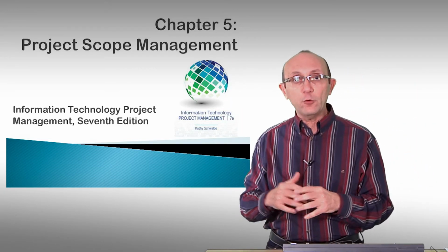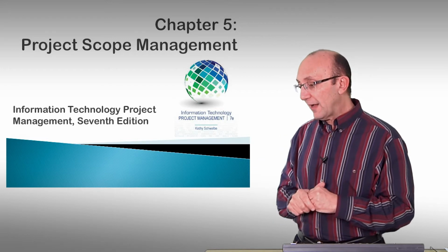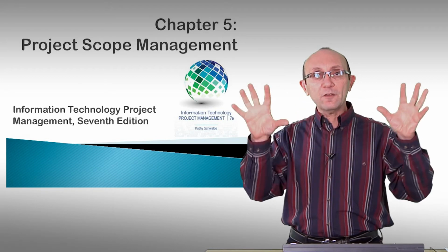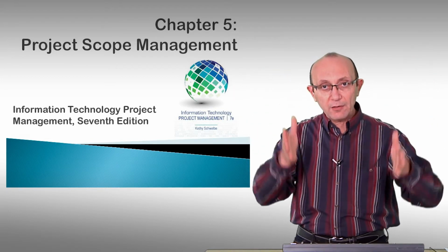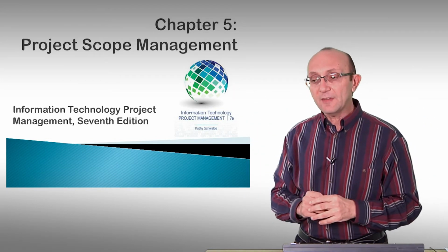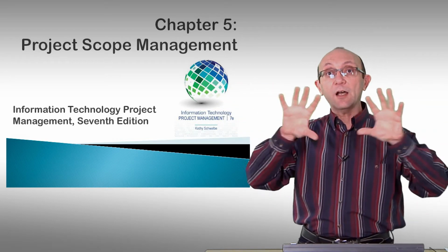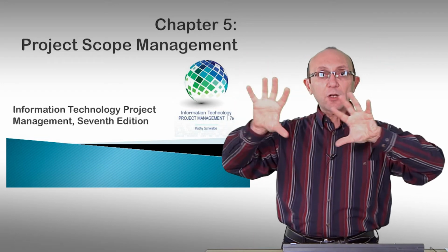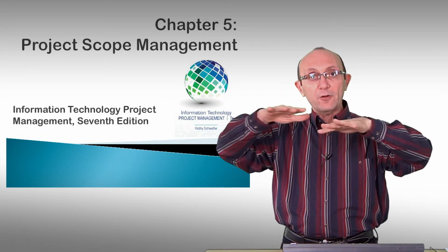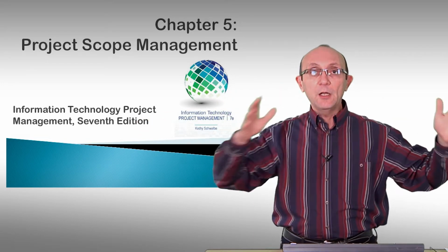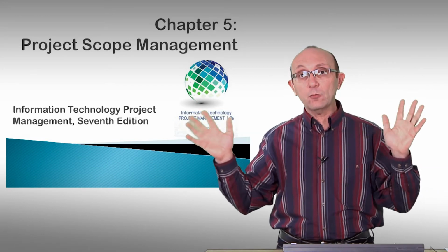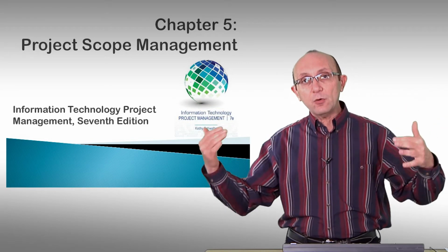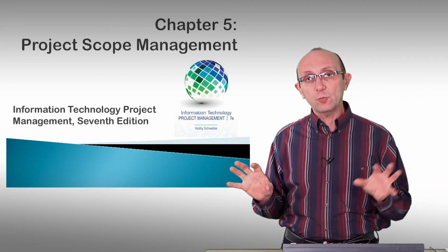So for example, if you imagine your software as having 5 modules, you don't want to start focusing on 3 modules and then dive down into details. That would be a mistake because you want to see all the high-level modules. So you start with a landing page, a home page, and then you cover the first lateral level completely, 4, 5, 6 modules as much as you want. Then you start going down into more and more details on each module.